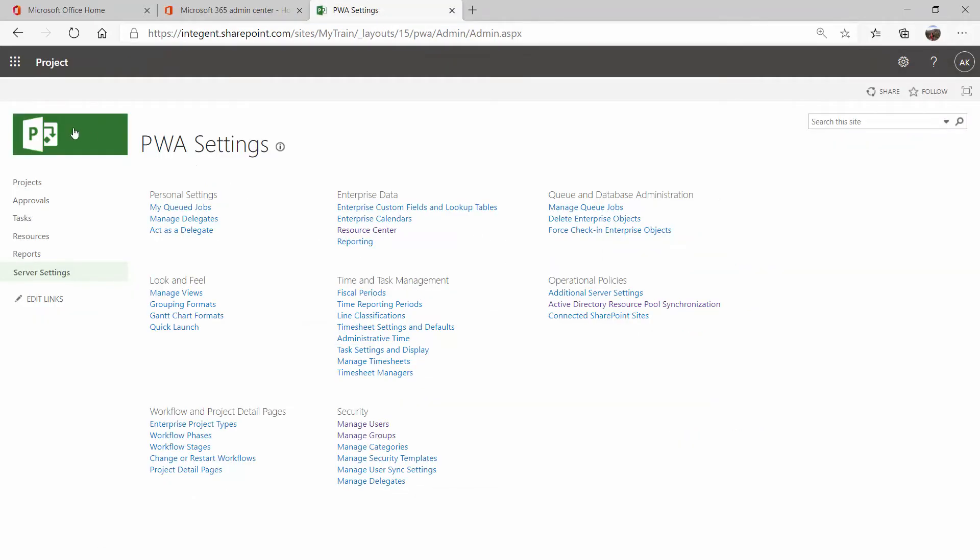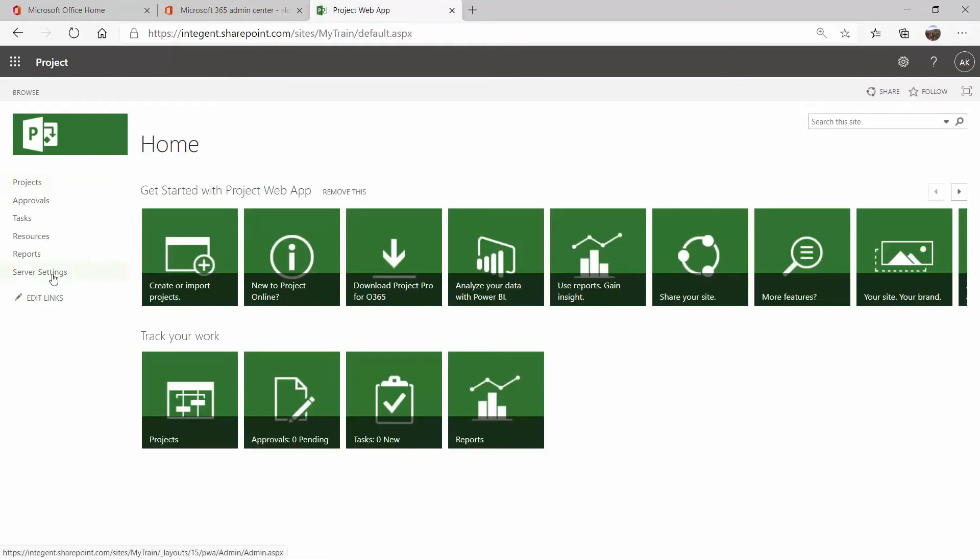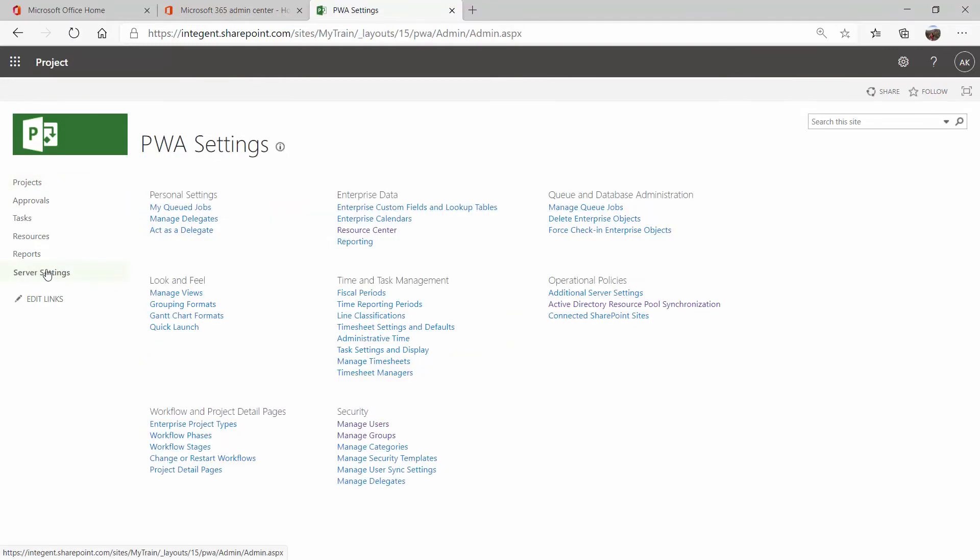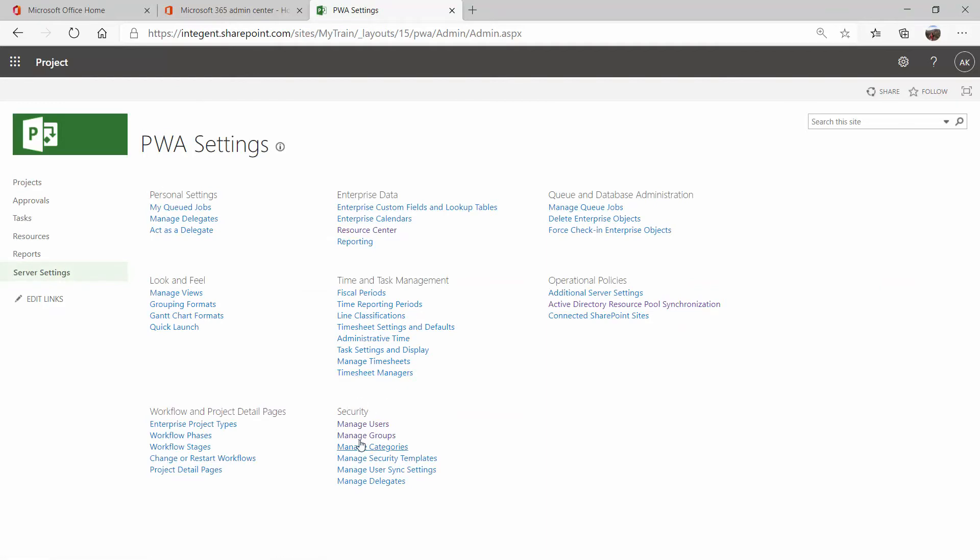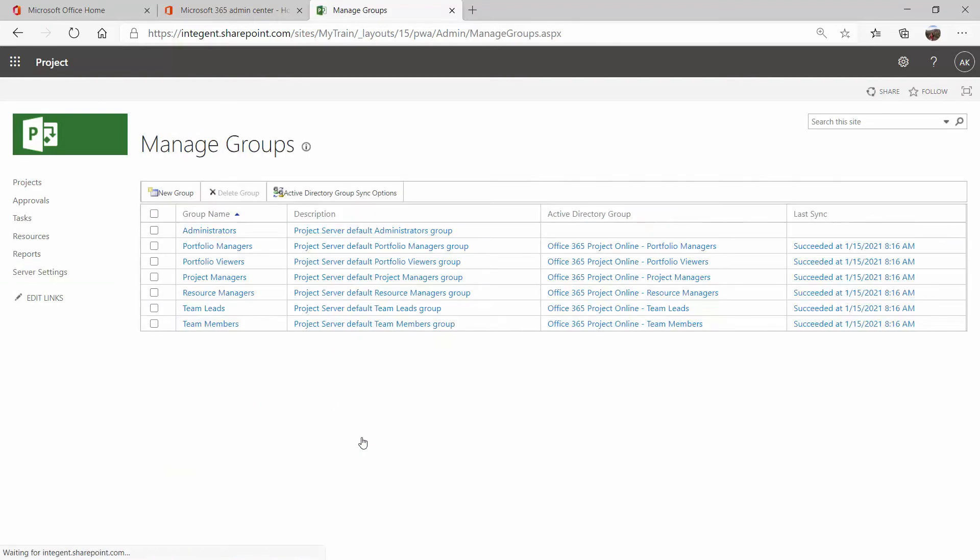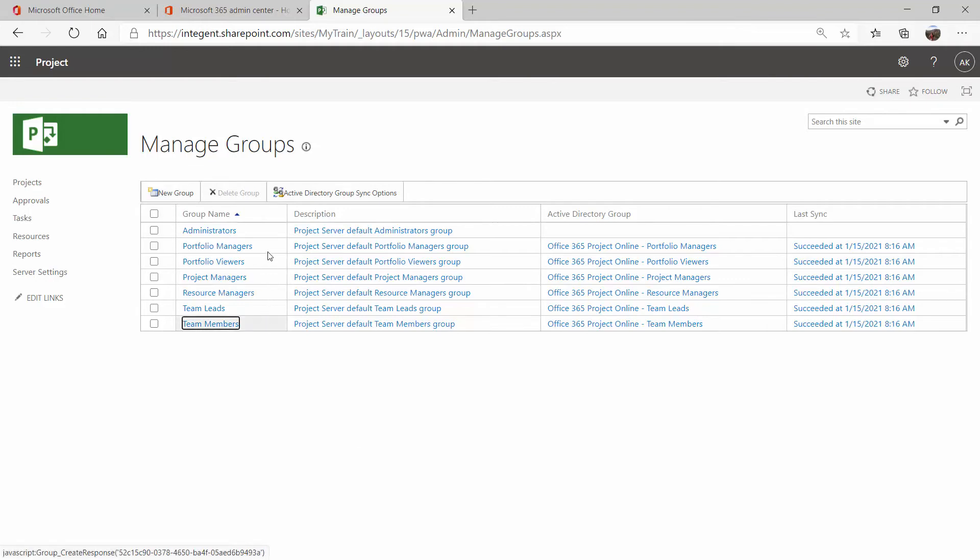So when I come back into Project Online, I can come to my server settings here. And again, there are two different Active Directories that we want to sync. One is security. These are the Active Directory groups we set up that have the role at the end of them. We have our project managers, our team members, usually administrators. I do not sync myself because I want to make sure that if I'm an admin in here, I will always have an admin. Somebody in IT can't take away my access just by removing me from that group. So usually admins, I don't sync.